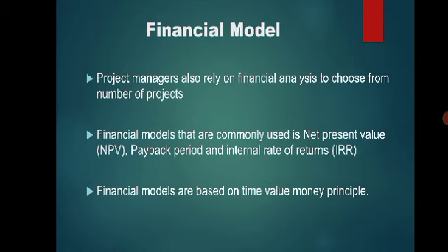So if it is $1 today and you are receiving $1 tomorrow, how much is the $1 you are receiving tomorrow worth today? So you bring that future value into present value, and then afterwards you compare the initial investment amount with the total present value. So if the net present value is higher or is positive, that means the project is viable.